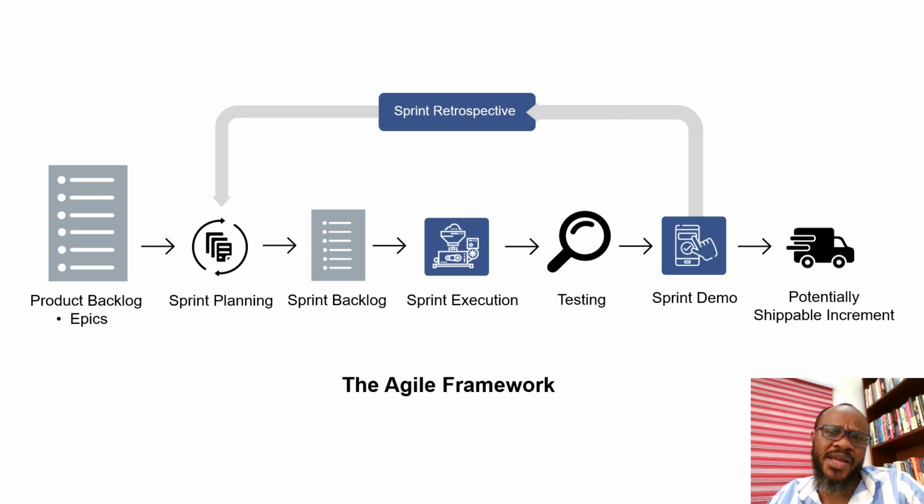Before we get into the details, let me do a quick overview of the Agile framework, especially for those who are still not clear about the framework. So this is the product backlog. This is where we break down the project vision statement into epics, or large user stories, and with constant customer collaboration, when these items within the backlog are implemented, business value will be created.